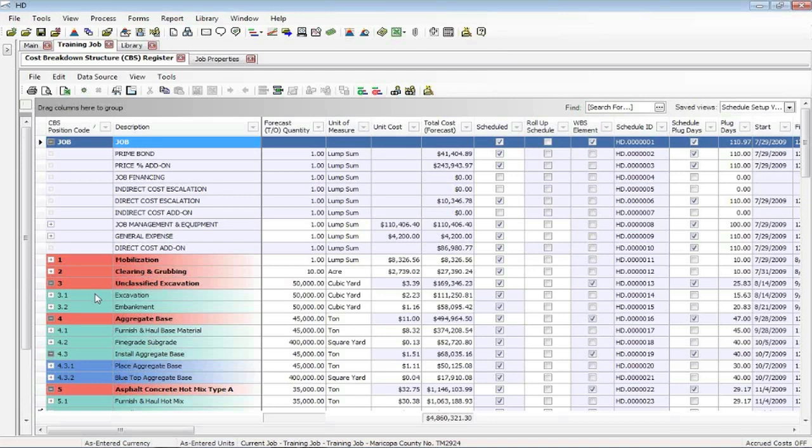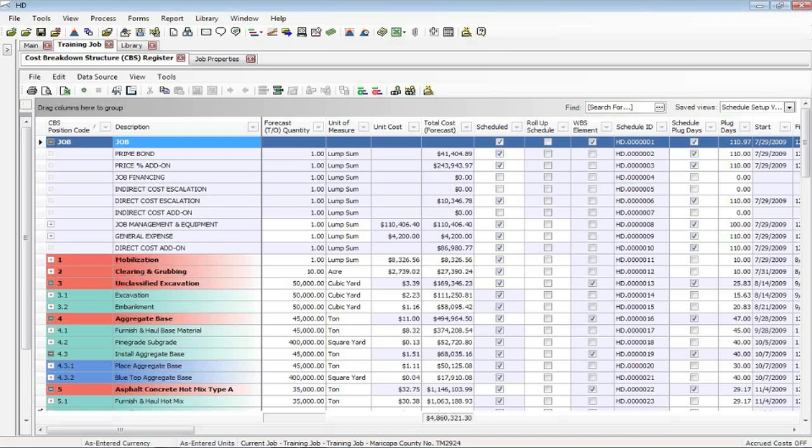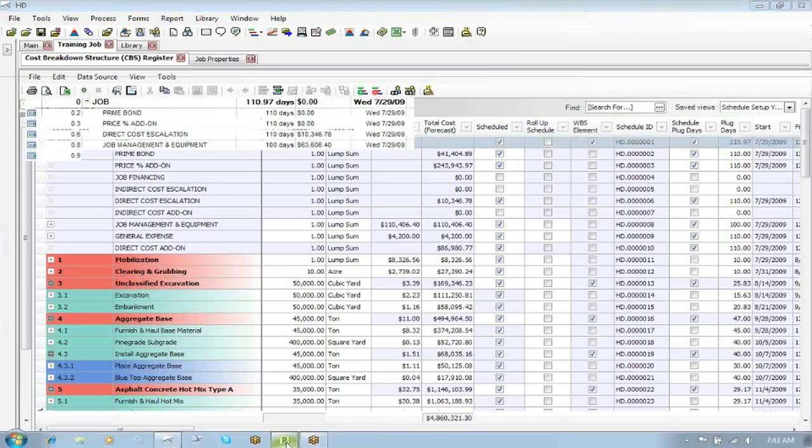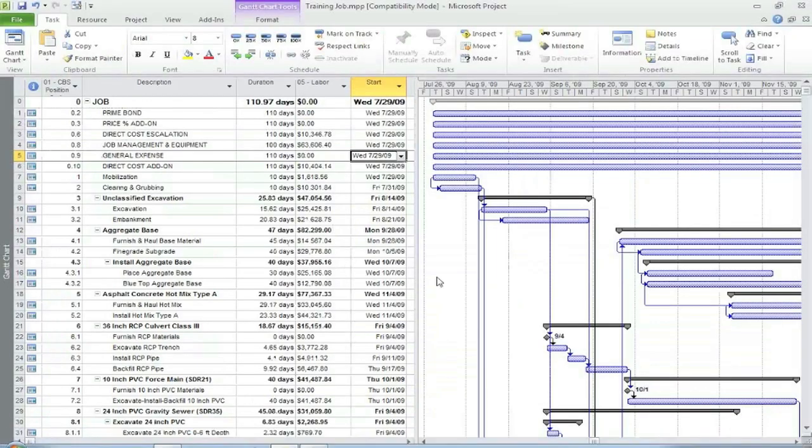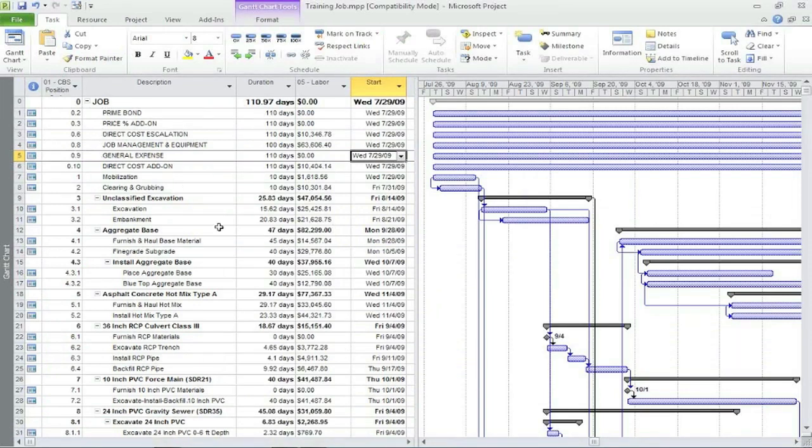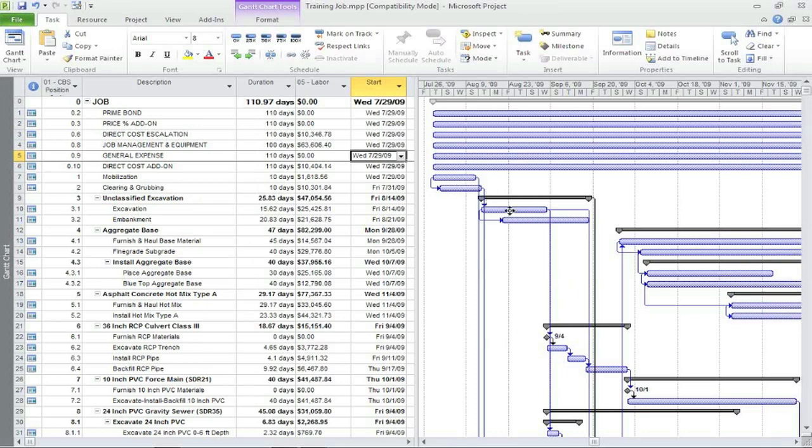Now I've already sent this information out to project, so I'm going to open it up. And there we are. So essentially what we did, we sent out these items that you selected with their durations. Then you had to make your logic links, which is what schedules are all about, to make your connections. And if you so choose, we can bring back the start and finish dates, all those dates that this schedule generated for us, and bring those back.